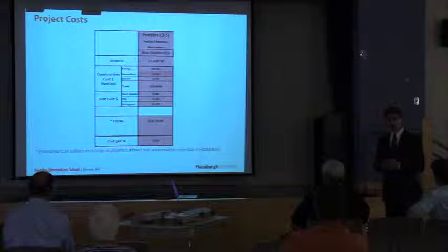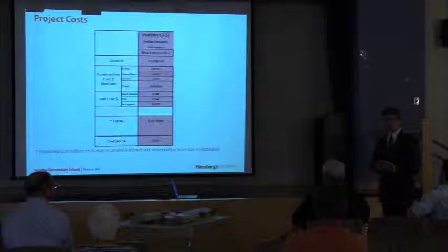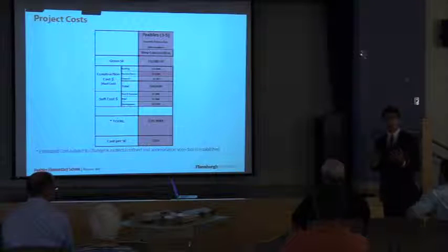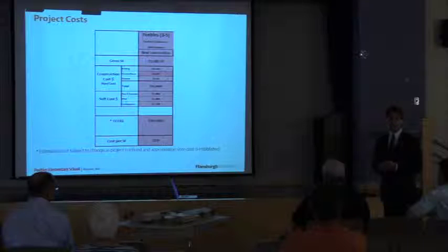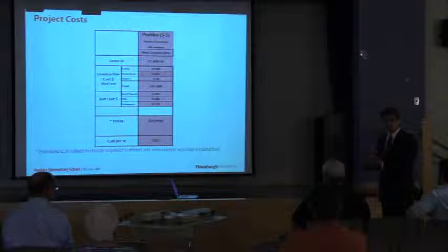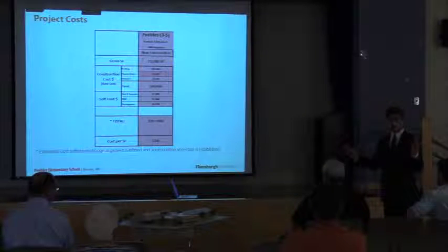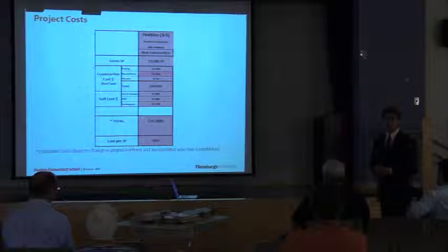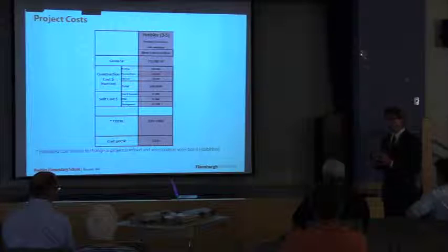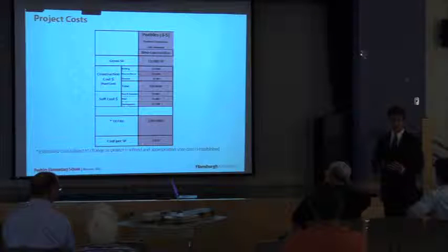The purpose of this schematic design phase that we'll be finishing in September is to advance the design further so we can get additional cost estimates done. There'll be two independent cost estimates done: one retained through my office, the project manager's office, and one retained through the architect's office. So you have two independent looks at what the building costs would be. Those cost estimates then have to be submitted to the MSBA, who will review them as well, all to make sure that the costs we bring to you as the voters are the costs for the project.